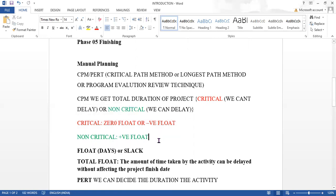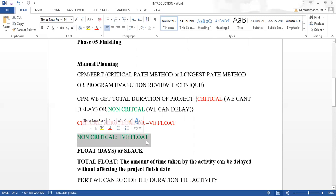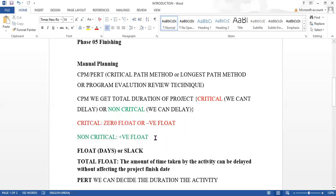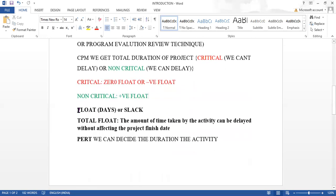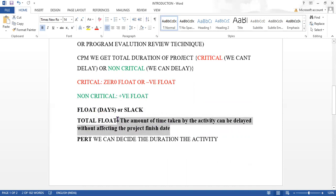For non-critical activities, the float is a positive number in terms of days, so you can delay them and the project end date will not change. Total float is the amount of time an activity can be delayed without affecting the project finish date. This is a key concept to remember when making any project plan.